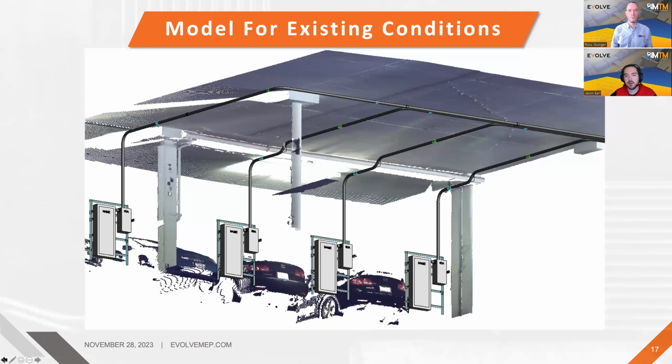If a building owner comes to me and says, "Hey, can you put these EV chargers in?" and I say, "Sure, it'll take me a week," and they're like, "I've got to shut down an area of my parking deck for a week." And then they go to somebody else and they say, "Yes, I can get it done in 8 hours." So the only way to do it in 8 hours is if we prefabricate everything ahead of time.